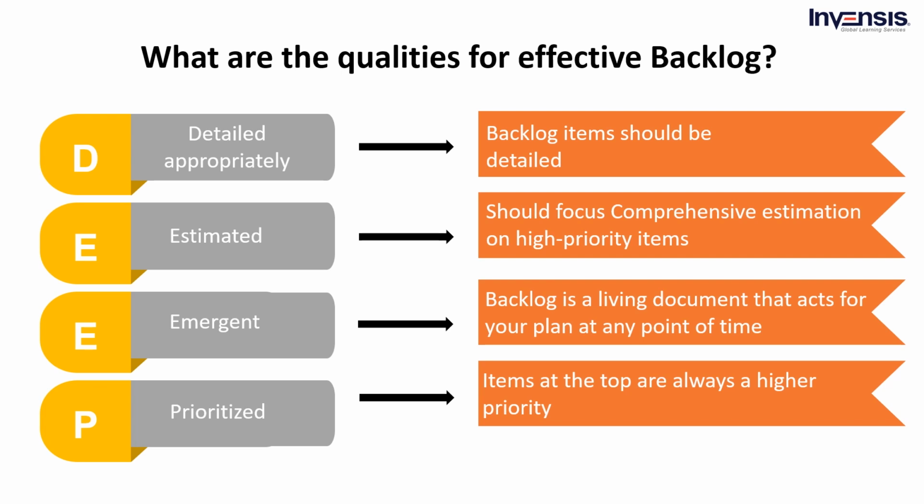In these cases, you should use a simple, agile estimation technique. Examples like T-shirt sizing, labeling work items as XXS, XS, S, M, L, XL, to make a guesstimate. Then, based on the information you have at that moment, make an approximate estimate of the effort necessary for that backlog item.